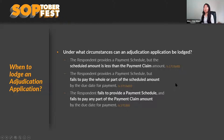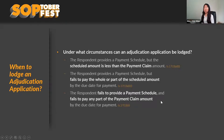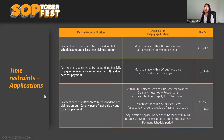The second scenario is where a payment schedule has been provided but the respondent has failed to pay the whole or part of the scheduled amount. For example, if the claim was $100 and they've only paid $50, you can still adjudicate because it's not fully paid. The last instance is where they've failed to provide a payment schedule and failed to pay any part of the payment claim amount.